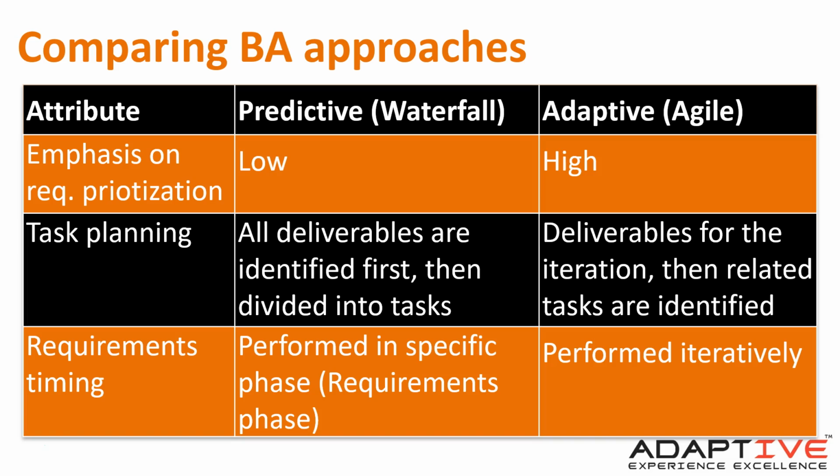Now, in highly agile, where they don't really dig into that strategy much, you will have a higher risk of undo redo and getting requirements wrong, and you don't figure it out until later. If you're doing a little bit more of the blend and you get a good understanding of the requirements from a business perspective and a need perspective, not from a data or a function or a feature perspective down to those details, but then you perform those iteratively while you keep in mind everything else, this is much healthier for organizations. But I still say be strategic and critical thinking.